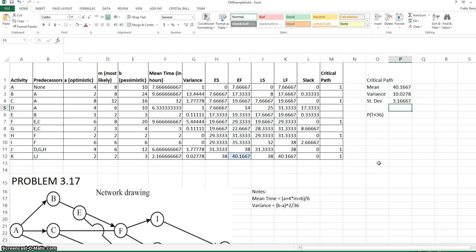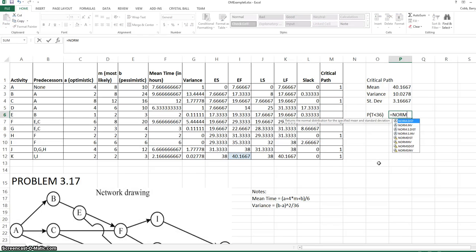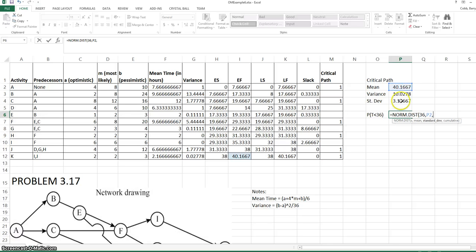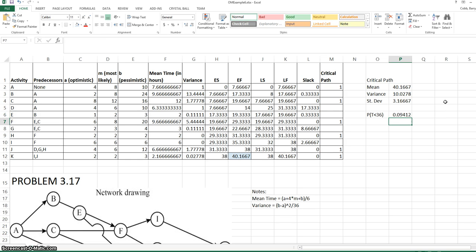Now we want to know the probability that this project completes before 36 days. We're assuming that the critical path time has a normal distribution. So to calculate this probability, we would use the NORMDIST function in Excel. The time we're interested in is 36. The mean is 40.17. The standard deviation is 3.17. And we want the cumulative probability of everything up to 36. We find it's about 9.4%.